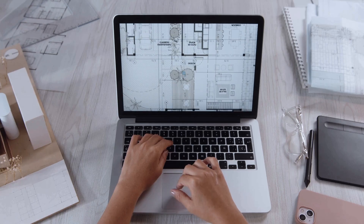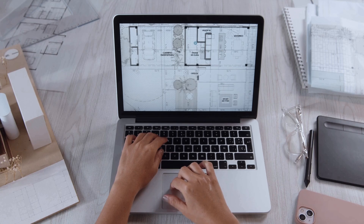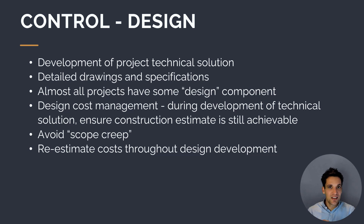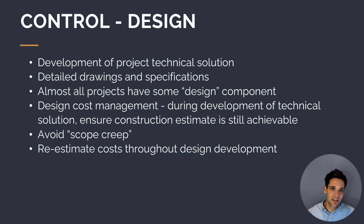Once we've set up our budget, we also need to manage design costs. Design is the development of the project's technical solution, and depending on the scope, we may be responsible for developing the design. If so, we need to manage the design process to ensure that what we're specifying we need to build, we can build for within our estimate. One of the easiest ways to save money — but also blow our budget — is through the design process. If we design something expensive to build with unnecessary features, it's very easy to blow our budget. We want to avoid scope creep, which is the addition of unnecessary costly features to the design.